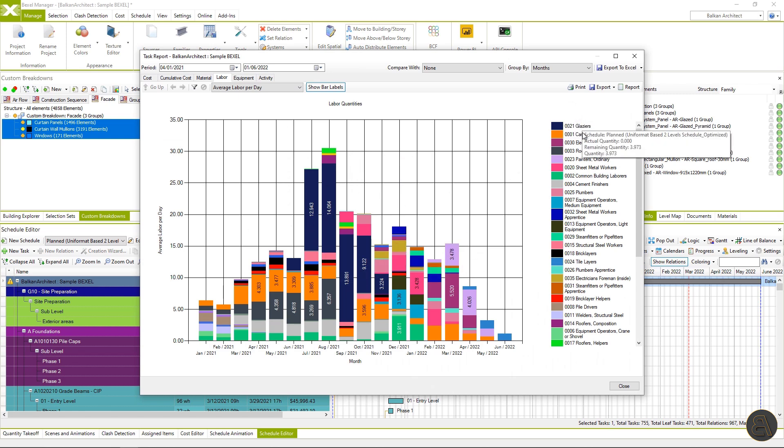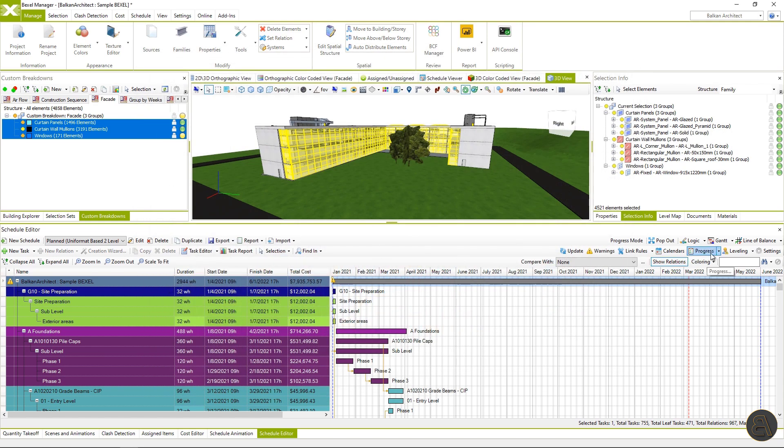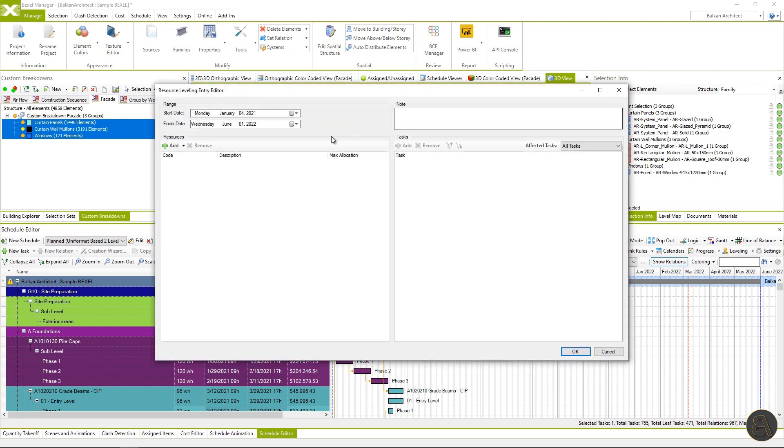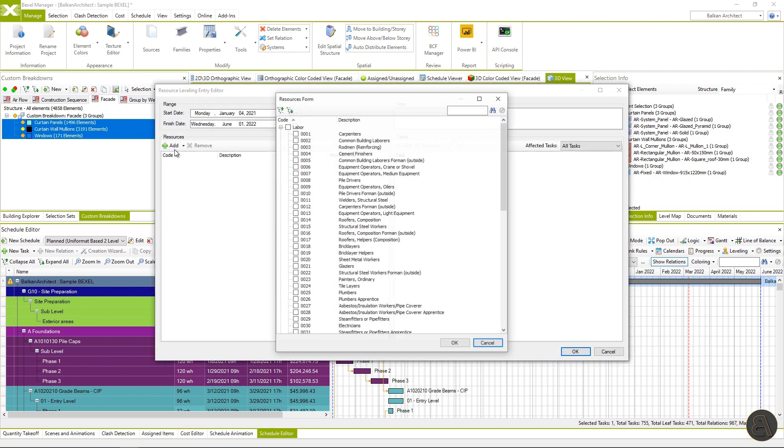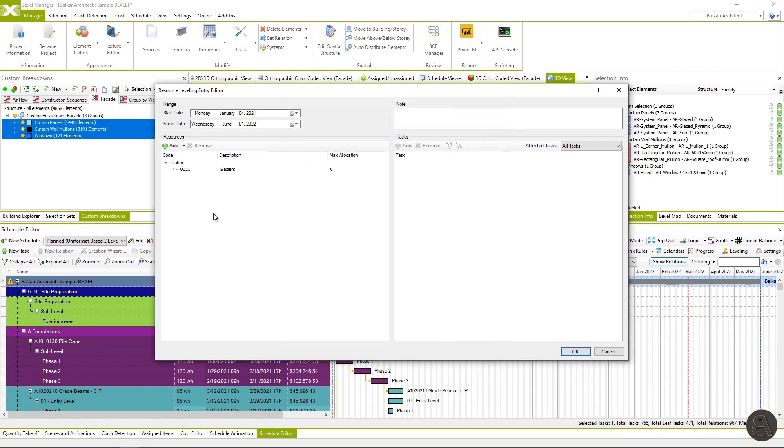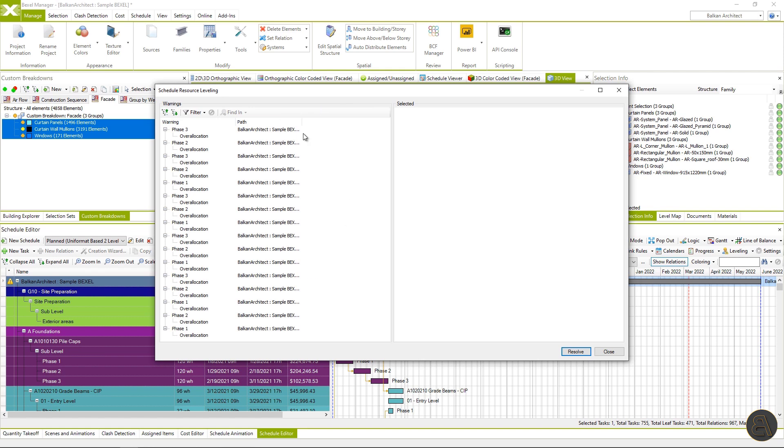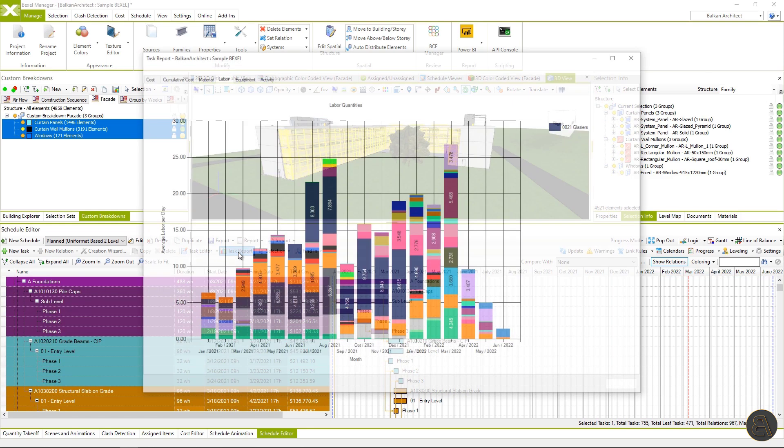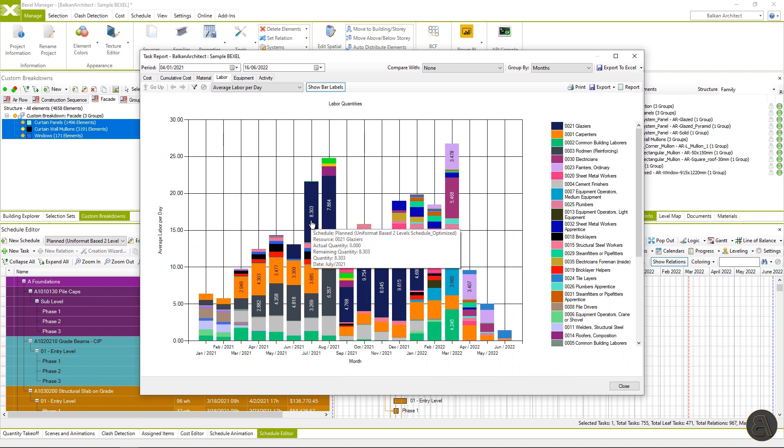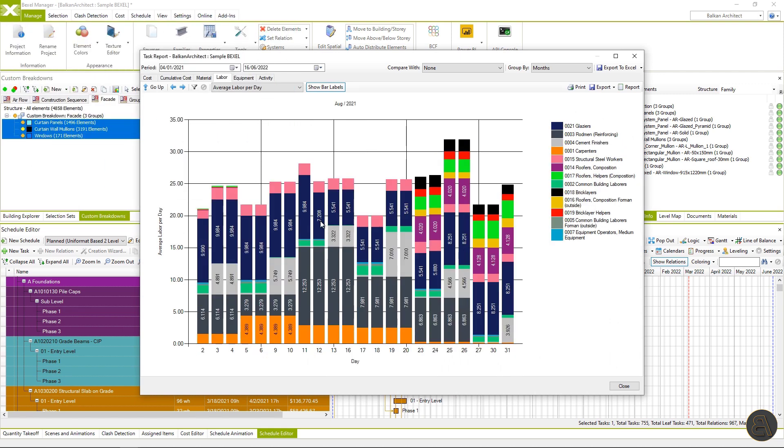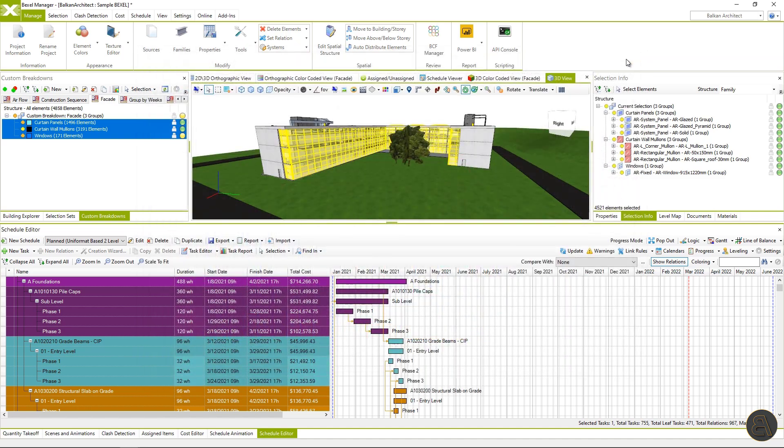I will show you resource leveling for the example on glazers. I will select the parent task and hit the leveling button. Here you can define the period of resource leveling, choose and filter resources and set the maximum number of resources that can be used daily. Hit OK, then apply button and a window with a list of all over allocated resources on the task will open. Hit resolve and OK. We can notice that the overall schedule duration has changed, and on the labor chart, we can notice differences in the glazers distribution. I will repeat once again. This is just an example.